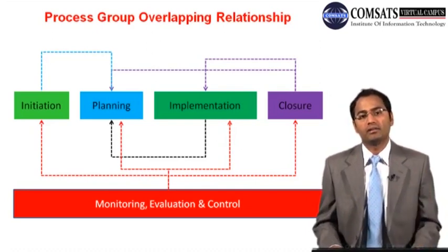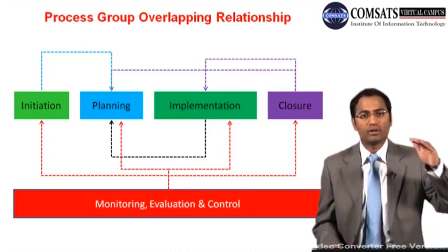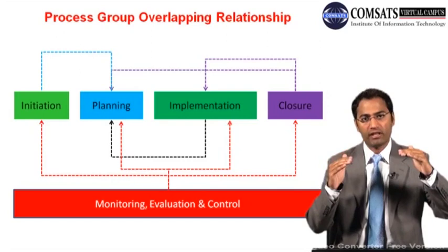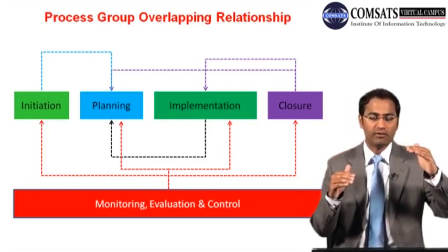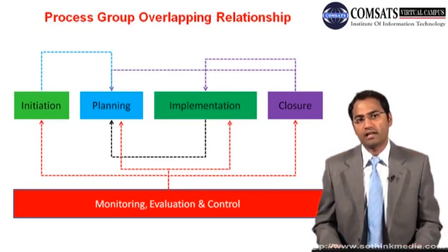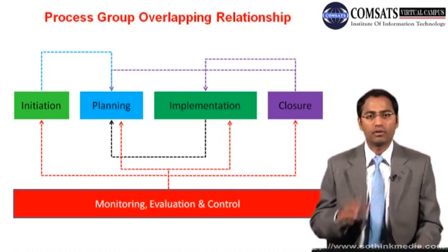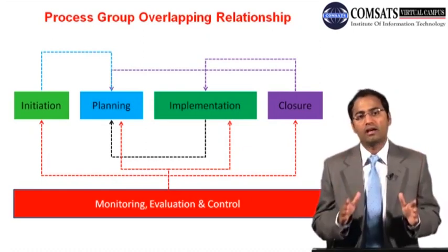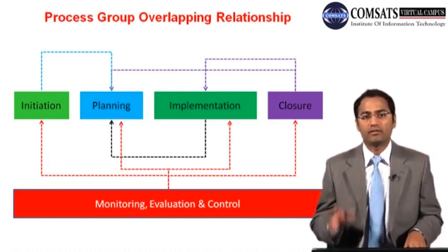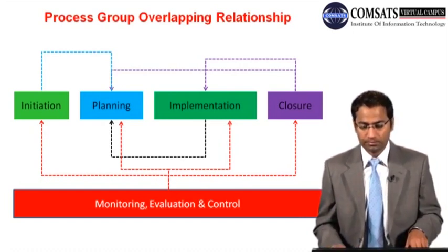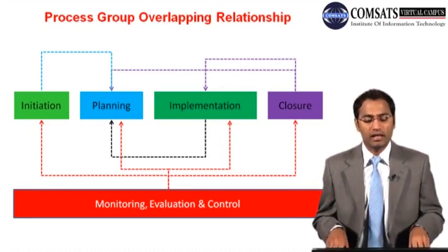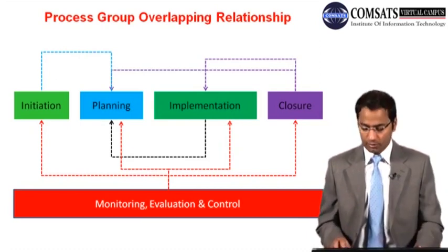on which we are checking our project, like what was the planned cost and what is the actual cost, and how much we have gained by this time, what was the planned time for this activity, what is the actual time of this activity, and accordingly we make some prediction or forecast of how much more time this activity will take and how it will affect the remaining ones. So these things take place in the monitoring, evaluation and control phase of the project.